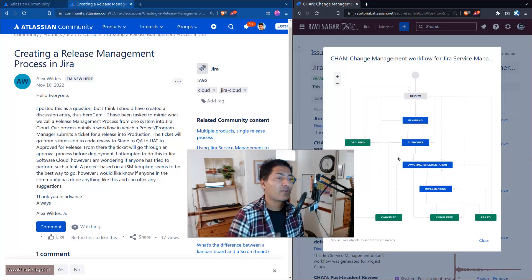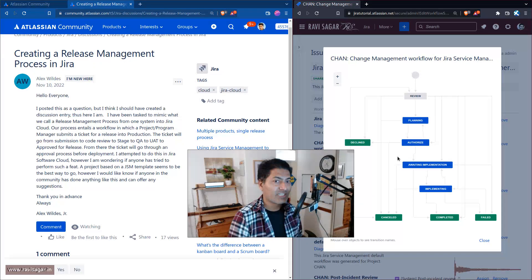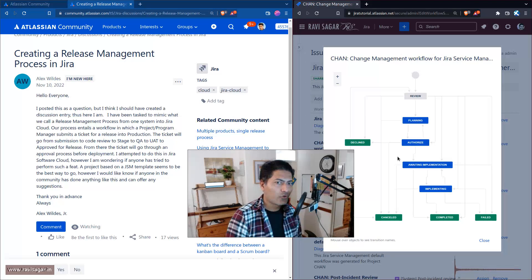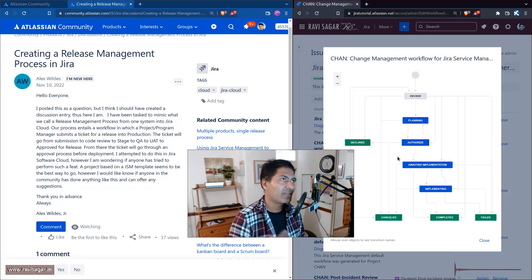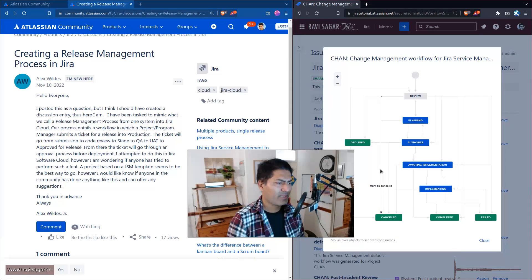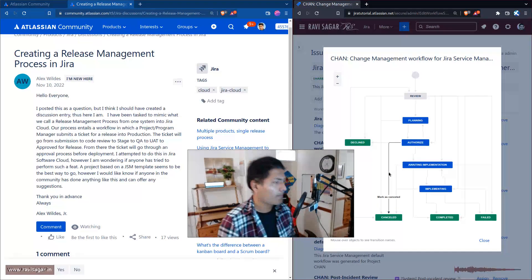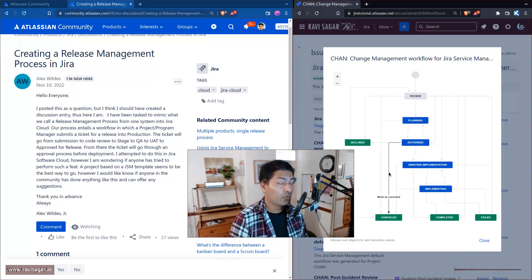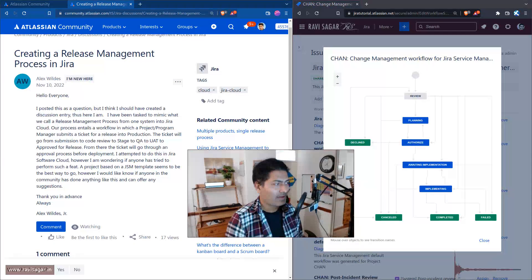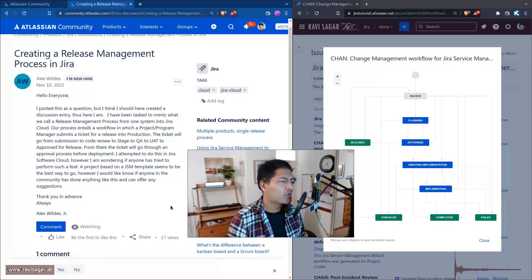Post functions define what happens after a transition. For example, if you reject a ticket you might want to close it and update the resolution to 'cancelled'. Some templates have this built in, but you don't need to use those — you can always customize it.